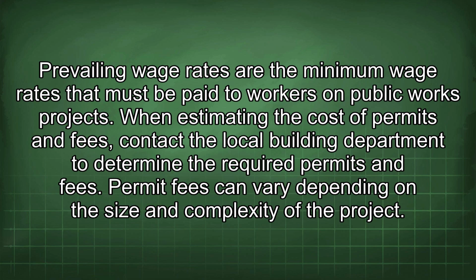When estimating the cost of permits and fees, contact the local building department to determine the required permits and fees. Permit fees can vary depending on the size and complexity of the project.